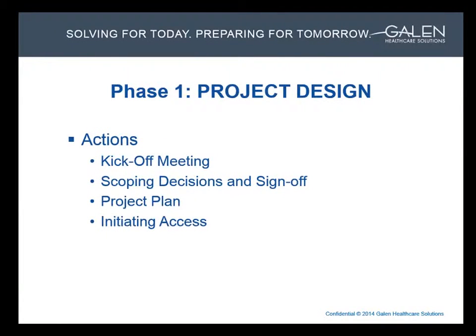The first phase is the project design. The conversion project begins with a client and a kickoff meeting to review the details of the items and scope for the project. The review provides the opportunity to ask questions and make clarifications so all parties can sign off on the plan of the conversion.